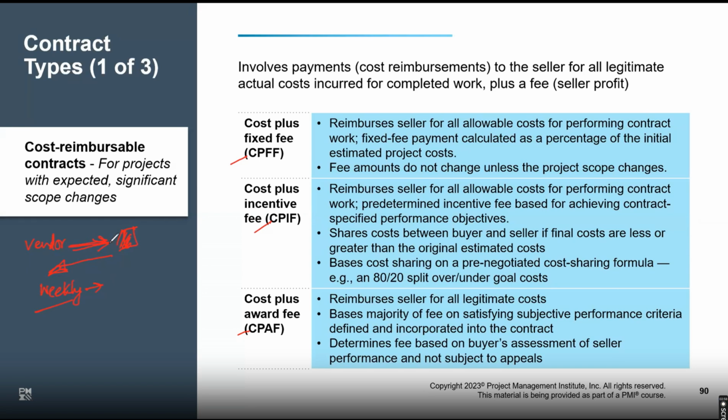I paid from my pocket, I got the money back. I paid from my pocket, I got money. That's not earning. That's not income. That's not profit. It could be weekly, it could be 15 days. That could be the criteria, or it could be amount based. Like when your invoice amount exceeds $10,000, then you can raise the invoice and we will pay you back. So that kind of contract. Whatever it may be, doesn't matter.